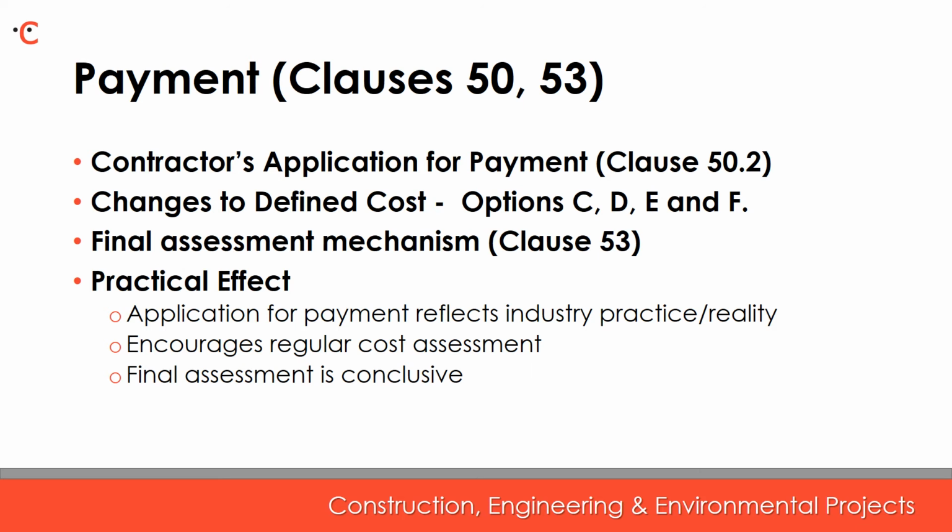This process is consistent with the NEC philosophy of proactive risk management and is in order to avoid any nasty surprises. In NEC4, there is a new process to allow the contractor to request that the project manager reviews the contractor's assessment of the defined cost. The project manager is required to review them within 13 weeks, and communicate his acceptance or otherwise advise of any errors identified. The project manager is sanctioned for non-compliance.